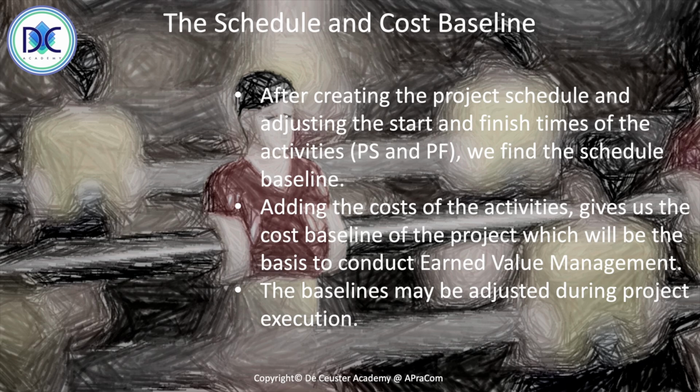And we always have to be sure that we are comparing the performance of the project with the most recent baseline. So there are changes that are happening, but when we talk about changes, it means that we change the baseline. Delays of the activities will not change the baseline. The baseline is still there. We didn't change anything to the project scope, but when we change the scope, we get basically new baselines.